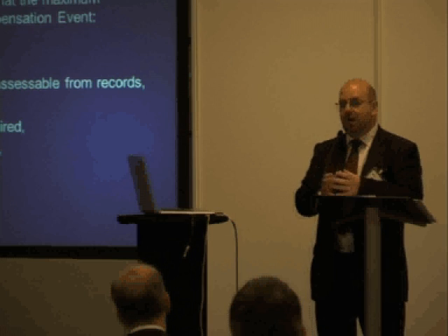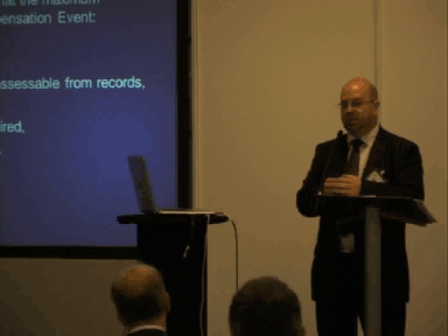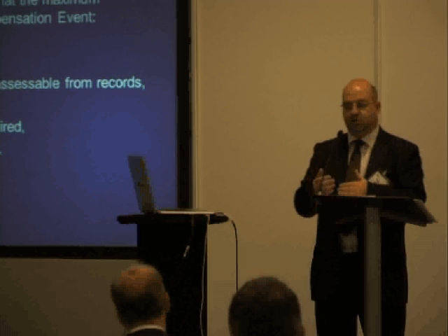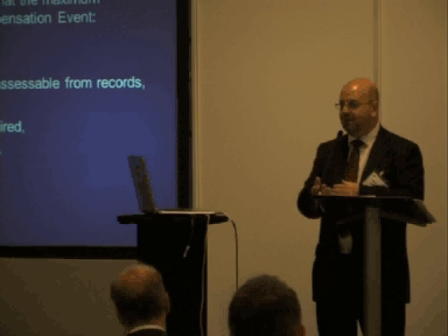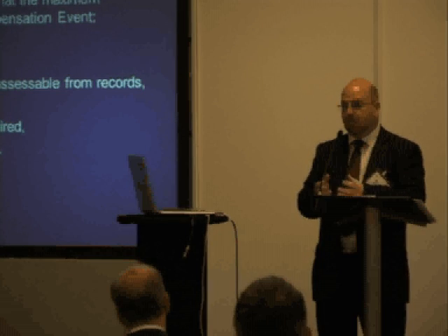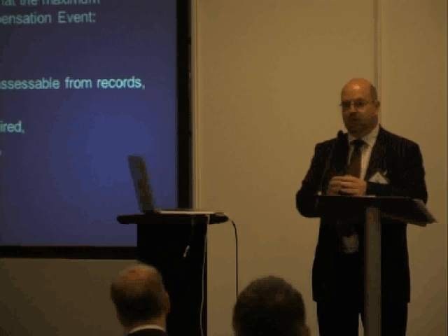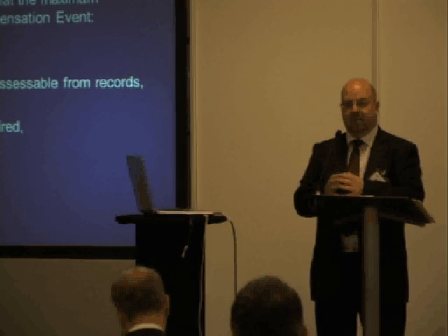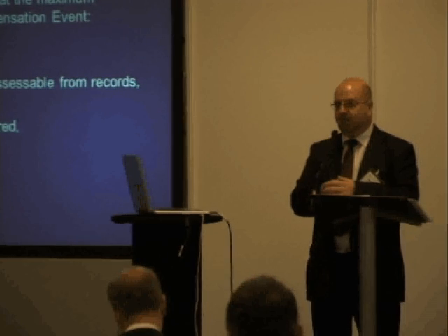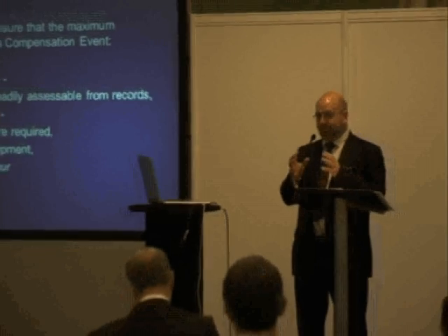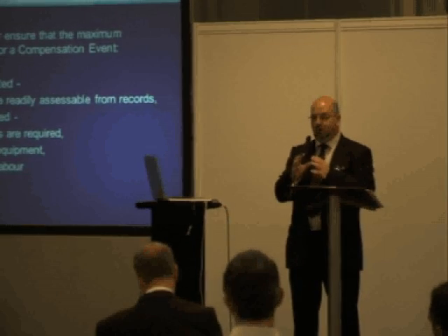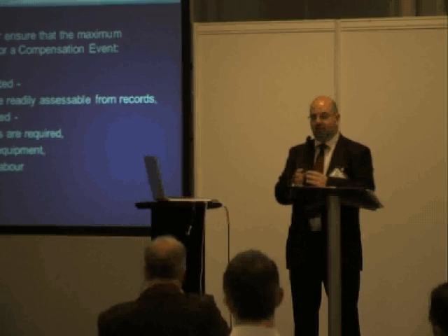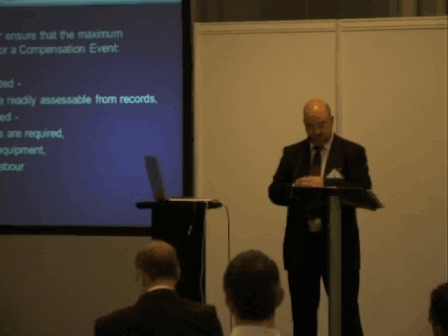If time is not increased as a result of a compensation event, then you must be able to demonstrate additional resource, restructuring of the programme, and how that has increased your cost. Disruption is incredibly hard to prove. Incredibly hard. It is the most difficult thing to demonstrate and then actually recover the money for. So in essence, the more robust the programme, the method statement and the resource profile, the better chance you have of recovering any loss due to disruption.